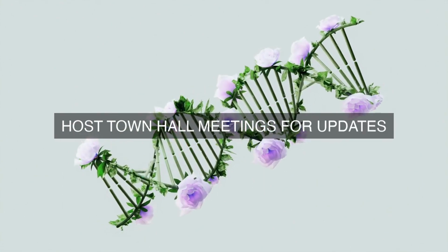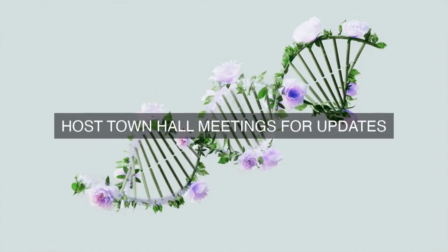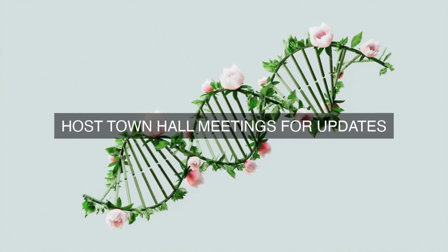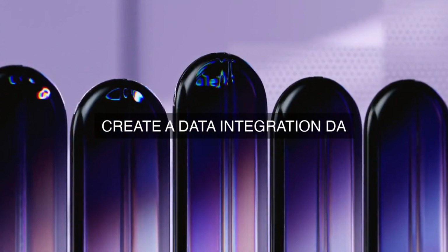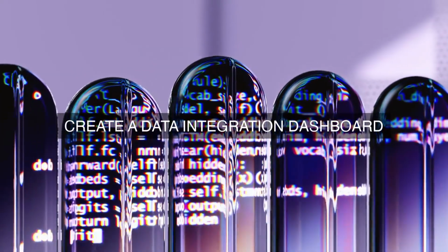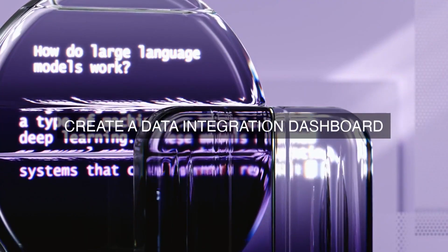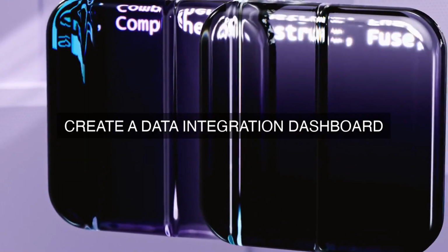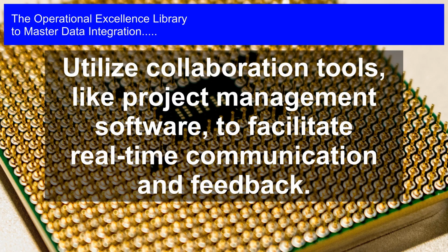3. Change management process. Develop a formal change management process to ensure that changes or updates are properly documented, approved, and communicated to stakeholders. This process should include change request forms to capture proposed changes and their rationale, change review boards to evaluate and approve changes, change implementation plans to outline timelines, resources, and impacts, change communication plans to notify stakeholders of approved changes.